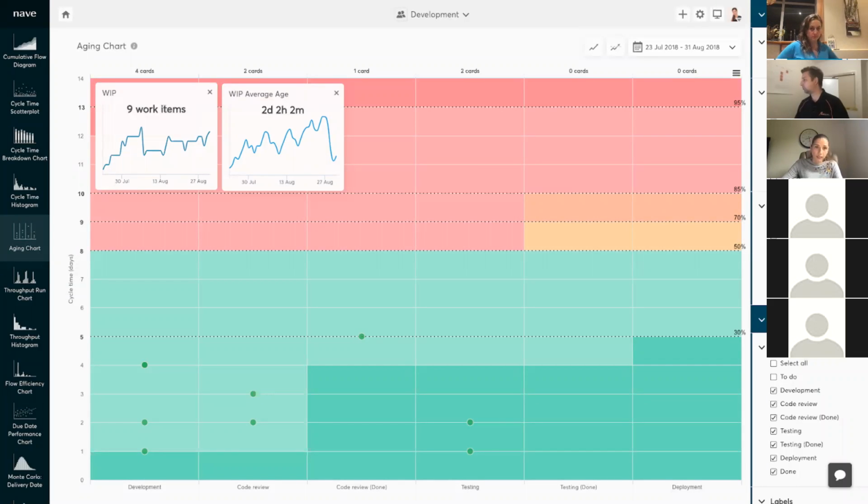As long as your tasks don't cross the percentiles you use to define your SLAs, you will be delivering on time. If you've committed to the 85th percentile, for example, and your work item just moved to the orange zone, crossing the 70th percentile, don't cut from the scope or rush the implementation to be able to deliver it on time. That will sacrifice the quality of your work. Instead, in order to make sure you keep your commitment, expedite your task.